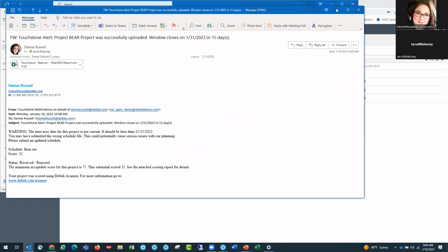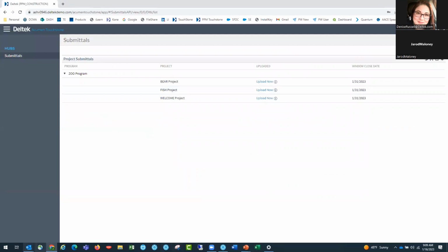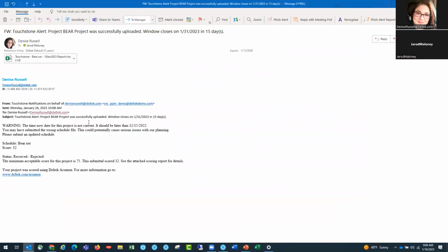Here it is. So this is what she received back as soon as I hit that submit. It's going to give me the report. Let me just take out the part where it was her forwarding it. Nope, I don't know what just happened. Back up. So you can see it'll give you, in this case, a warning that my time now date wasn't current. Shows my score. So I scored a 32, which was received, rejected. If it had been over 75, it would have said received, accepted. So you can adjust the terminology that comes out on that. In this particular case, it wasn't even close. So it scored a pretty low score.